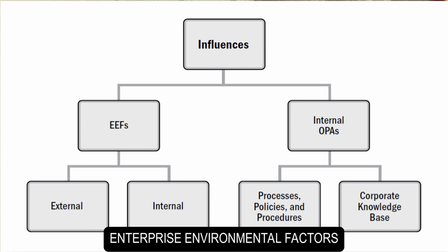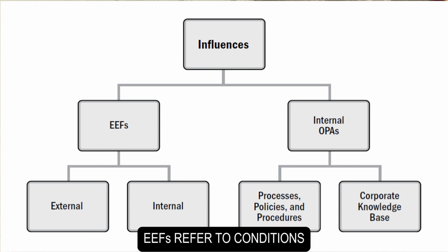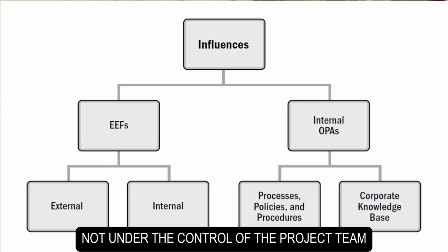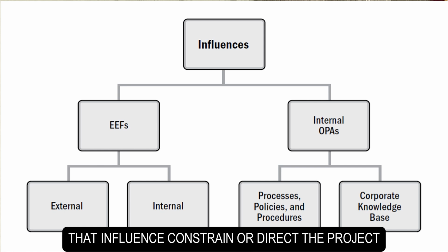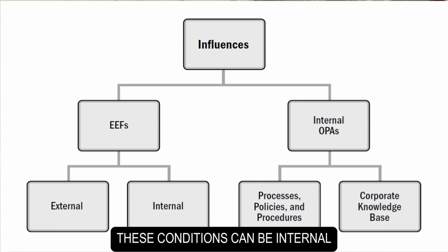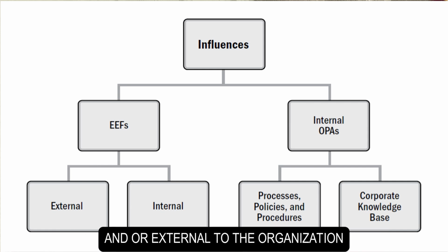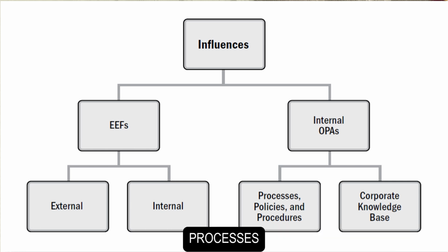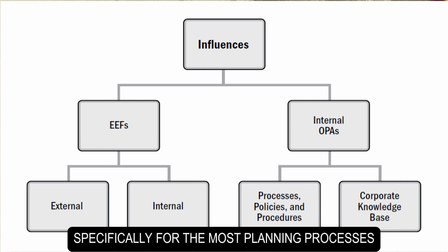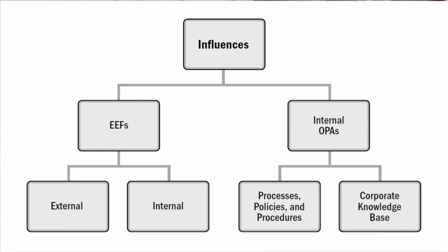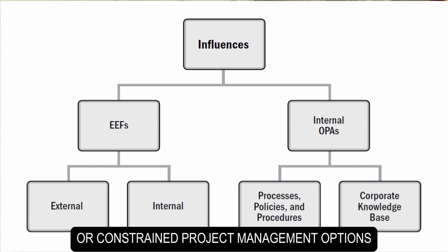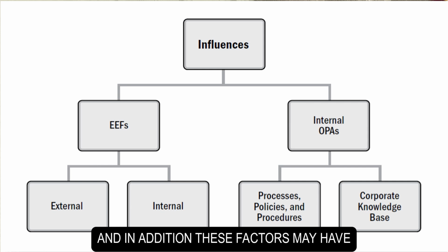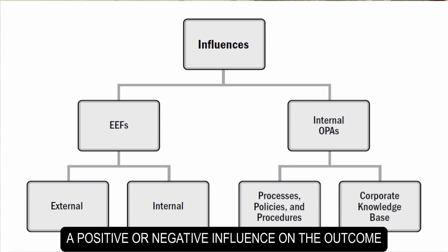Enterprise environmental factors, EEFs, refer to conditions not under the control of the project team that influence, constrain, or direct the project. These conditions can be internal and/or external to the organization. EEFs are considered as inputs to many project management processes, specifically for most planning processes. These factors may enhance or constrain project management options, and in addition, these factors may have a positive or negative influence on the outcome.